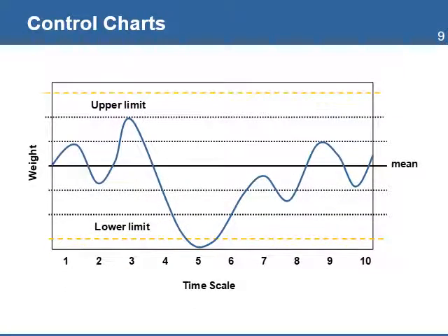Control charts display data that illustrates the results of a process over time. The chart helps determine whether a process is in control or out of control over a specified length of time. For example, the chart shows the process of controlling the weight of products manufactured by the beneficiaries for selling in local markets. The customer has a limit tolerance for defects. These are the upper and lower control limits in the chart. Items above or below the limits will cause problems to the customer and the efforts of the beneficiaries to sell their products.